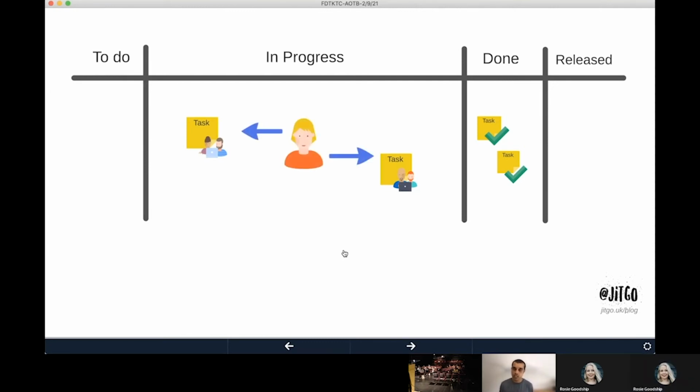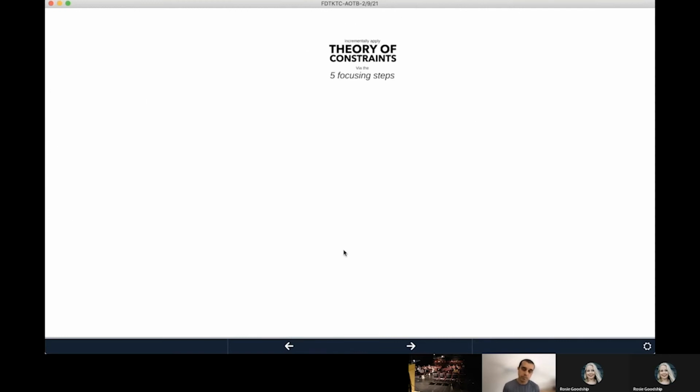Like, what kind of work do we need our testers to get involved with? And it might not be every single ticket anymore. It's probably going to be a few key ones where you really want to throw your best people at it. And so the testers and the team can work together to figure out when they use that individual to help them with their work. And so your averages come down and you go back around the process and you identify the next constraint in the process and you start the whole process all over again.